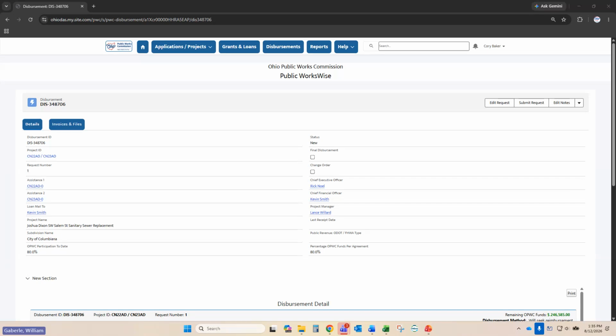Can a disbursement summary be added to the signature page, or can the same digital signature be added? Can I just add to this? You don't want to add anything to the disbursement signature page. That should be a separate upload from anything else. Your summary would be something that you would attach. Let's say you have multiple invoices from one particular vendor.